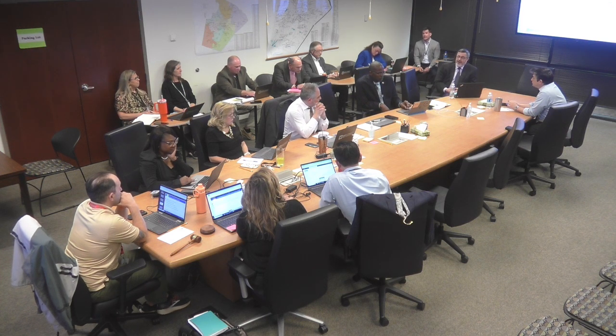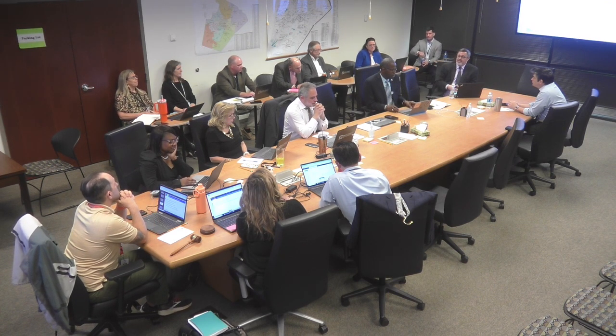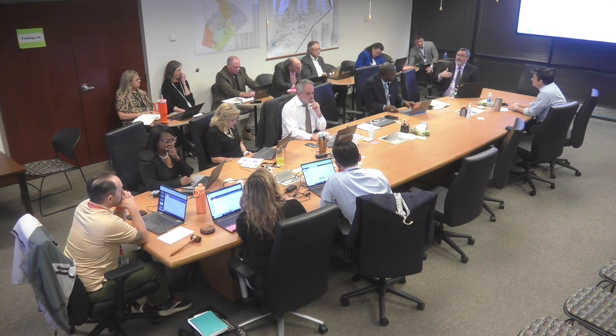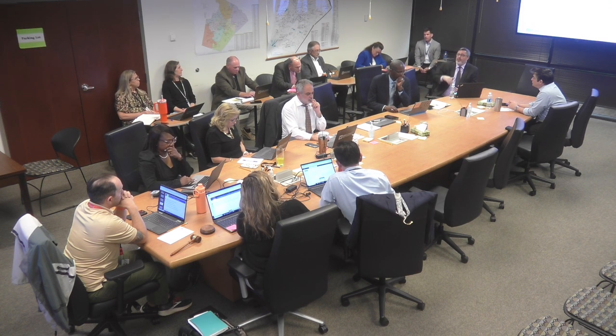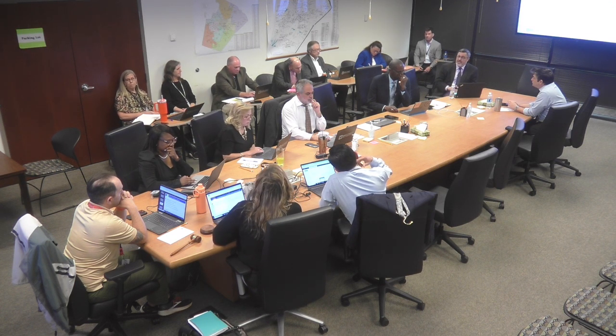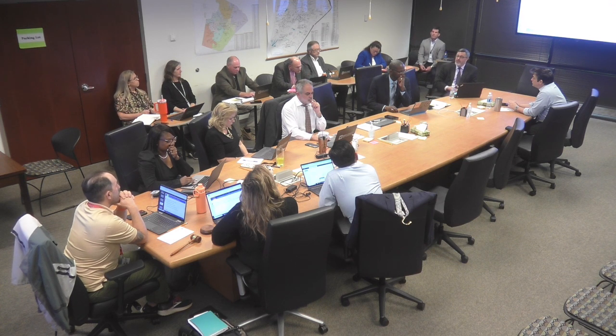Correct. And I'll add, you need to be flexible on the outer years, because data changes. So I think we've got a list of renovations that the facilities design, capital improvement plan team has been working on. And so we're working down to try to prioritize renovation projects as they need to be brought up on the list. And then when they're brought into the capital improvement plan, we'll look at any of the trailers on those campuses and see if we can bring the trailers into the building capacity. If not, then we'll need to look at refreshing or refurbishing them, because we'll need them for longer term. So that's part of our plan.